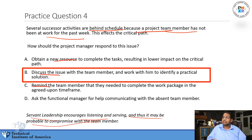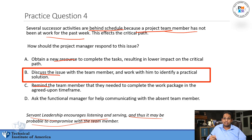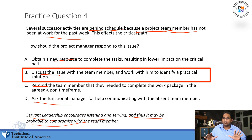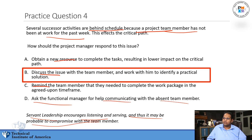Choice D — ask the functional manager for help communicating with the absent team member. Never really go with choices that involve senior management or functional managers. Very rarely will that ever be the correct choice. Before you select one of those, think hard. This is your project and you have to deal with it yourself.